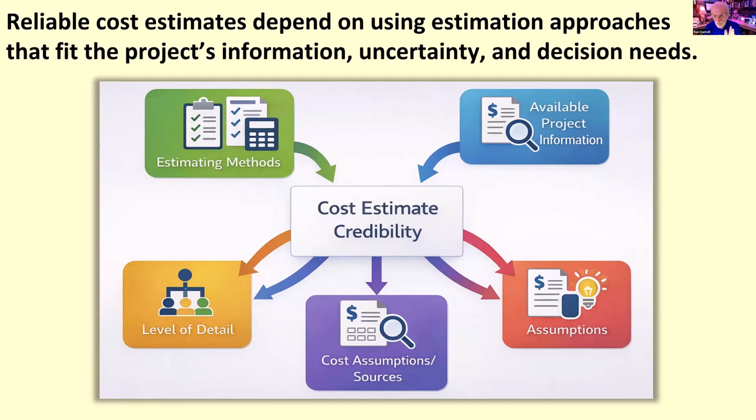And it shows that early in the project, we're usually really way off with our estimates, and we don't get into where we can do a good reference type estimate, one we can use for planning, as more time goes by. And it shows how that uncertainty affects that. But it sort of explains this as the scope becomes clearer and activities get better defined, the project can usually estimate with greater detail. So that explains that cone of uncertainty.